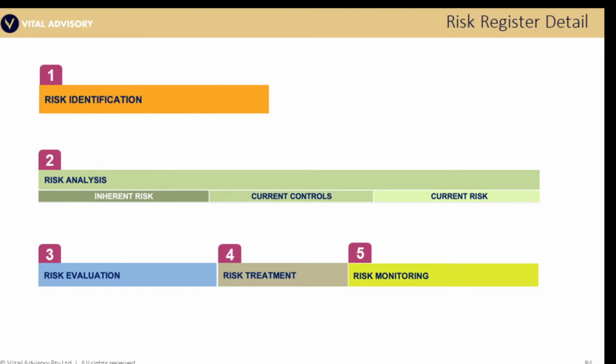Does it meet our risk appetite, our risk criteria for acceptance, yes or no? And if it doesn't, what's the treatment? And if we're going to treat it, do we need to monitor the treatment? And if it's back up here in this high inherent state, if it's a high inherent risk, I would recommend also you consider risk monitoring for it.